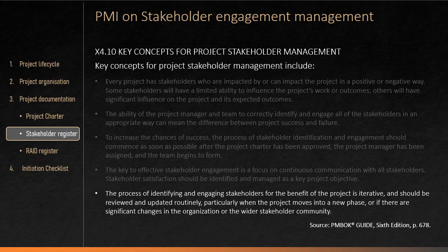And finally, the process of identifying and engaging stakeholders for the benefit of the project is iterative and should be reviewed and updated routinely, particularly when the project moves into new phases or if there are significant changes in the project organization or the wider stakeholder community. I hope you agree with the statements provided in the PMBOK and will engage your stakeholders accordingly.